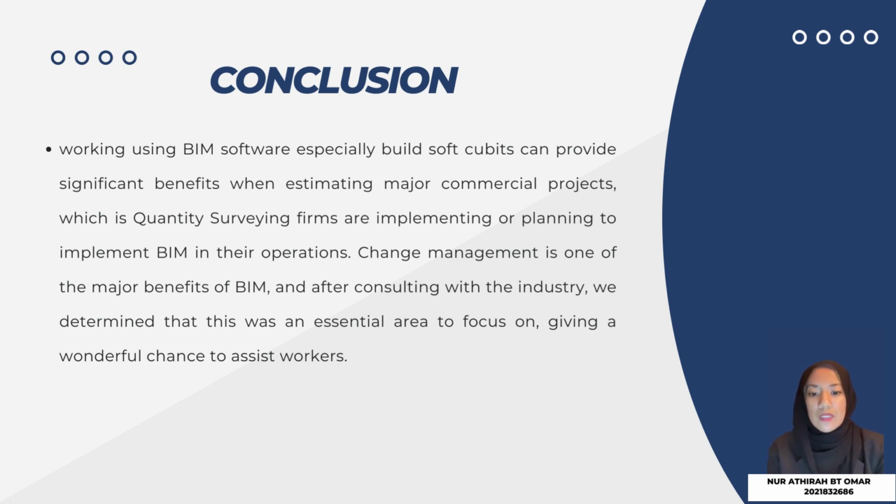Qubit will automatically update existing items in the estimate that have been impacted by the new model, applying the change and highlighting the item with a color indicator in the estimate sheet, calculation sheet, and shape pane, taking change management to the next level. That's all from us.